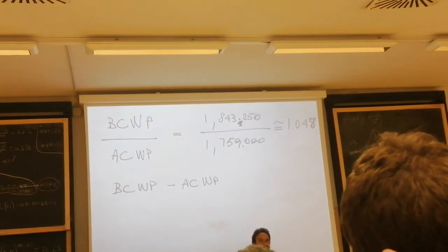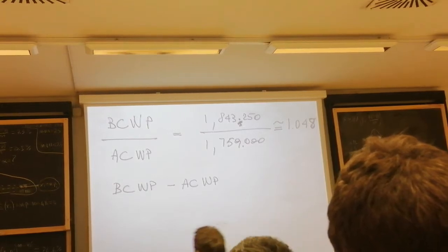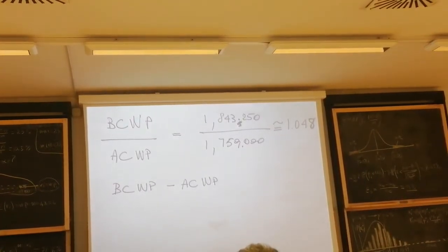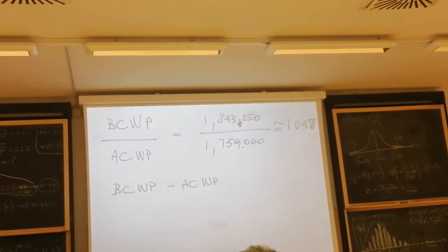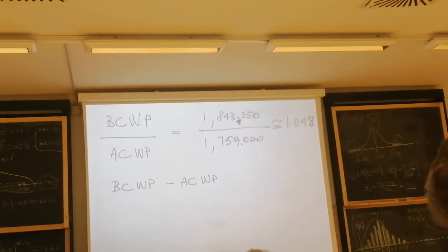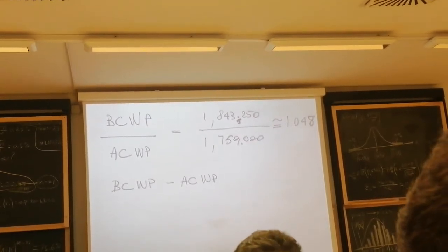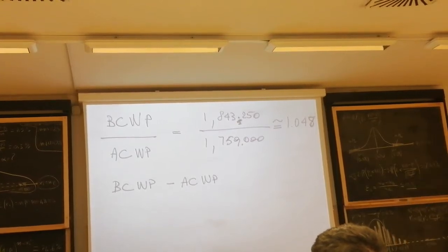So Faith, I think you're wrong. I made a calculation only for the technical construction. I only consider the technical infrastructure. Oh, you just worked on technical infrastructure. But the full project cost, if you consider both tasks, it's making savings. We're saving money. Why are we saving money? Because 1.04, we're saving 4.8% on our budget.